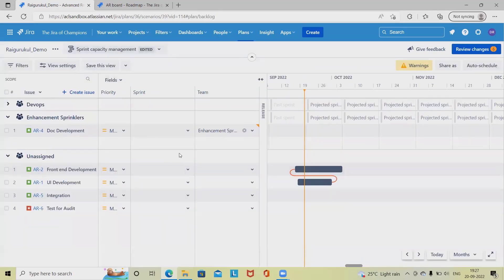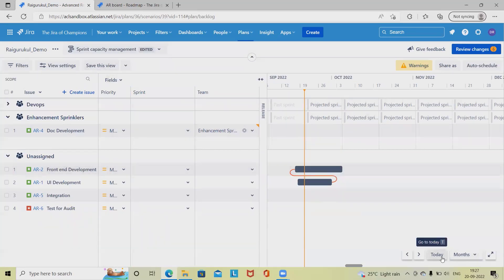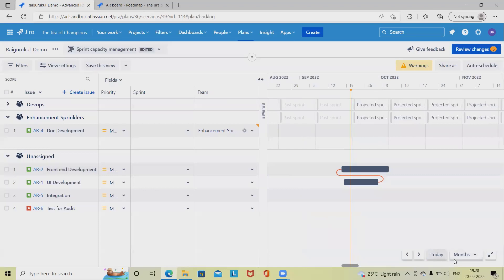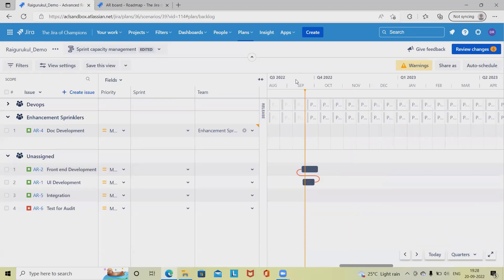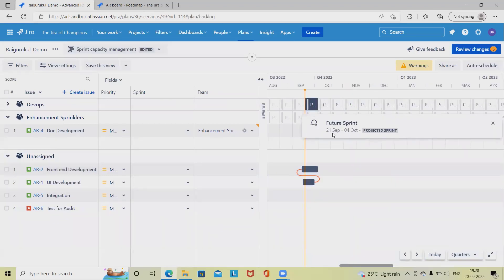Jumping into the sprint view, we can see the project sprints are highlighted. We can view on a monthly basis or quarterly basis according to our need. Once we select, we can see the sprint projections, start date, and end date.